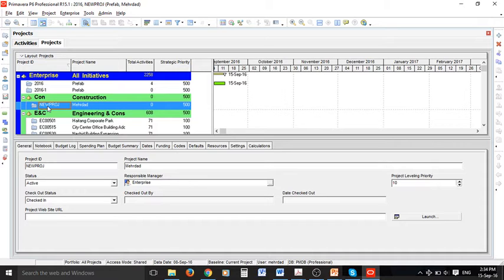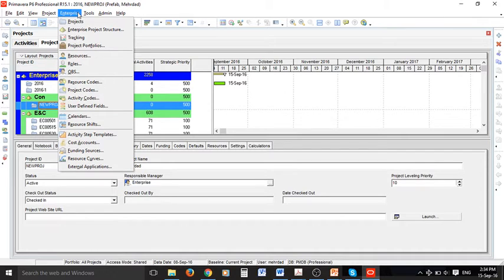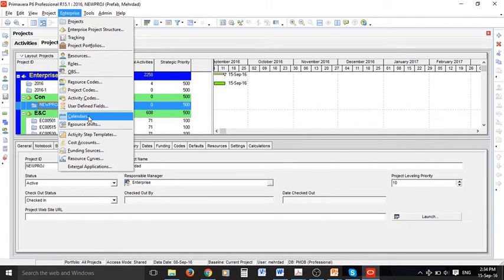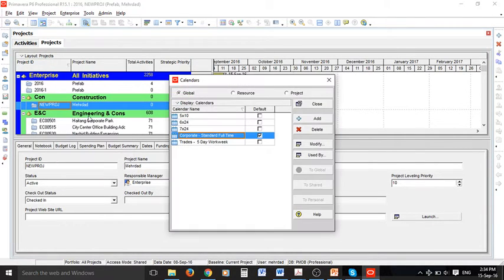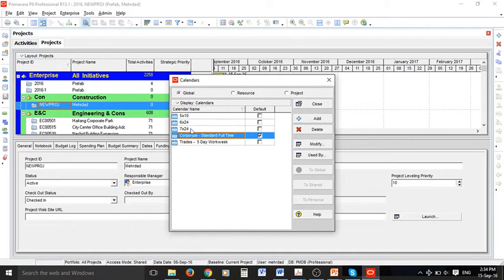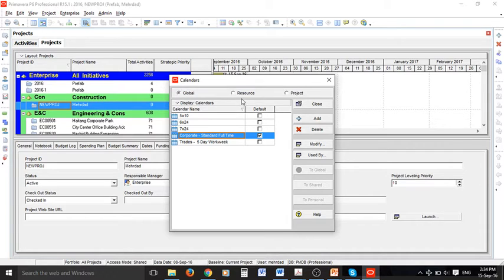The very important thing we want to talk about now is how to set calendars. In the enterprise menu we have calendars option. By default there are a number of standard calendars in here. They can be global, resource, or project calendars.